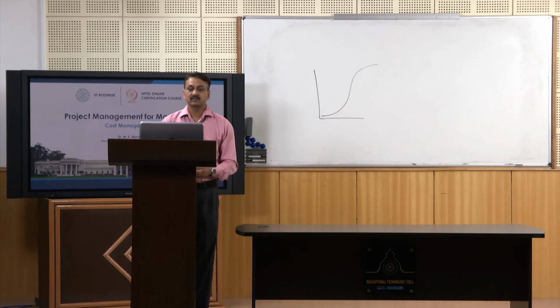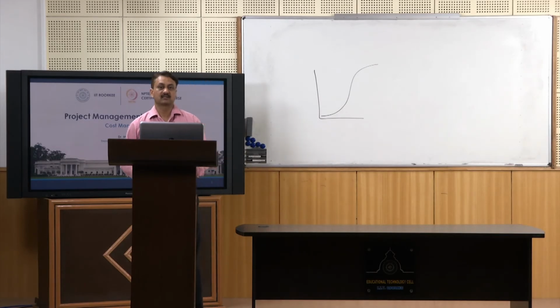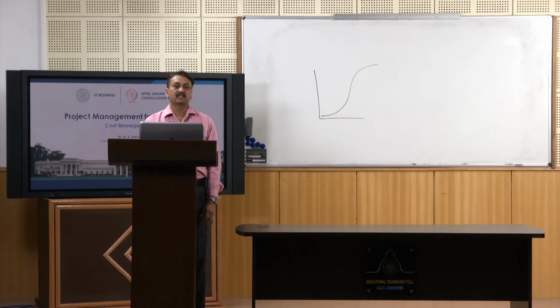So, this is the drawback of the project S curve, it does not look at performance. Then you have something called milestone analysis. Milestone analysis means you will always have some special occasions in the project which you would like to celebrate. For example, if you have achieved one particular phase of the life cycle of the project. Let us say you are making a 1000 kilometer road, and you have completed 50%, so that would be a milestone.